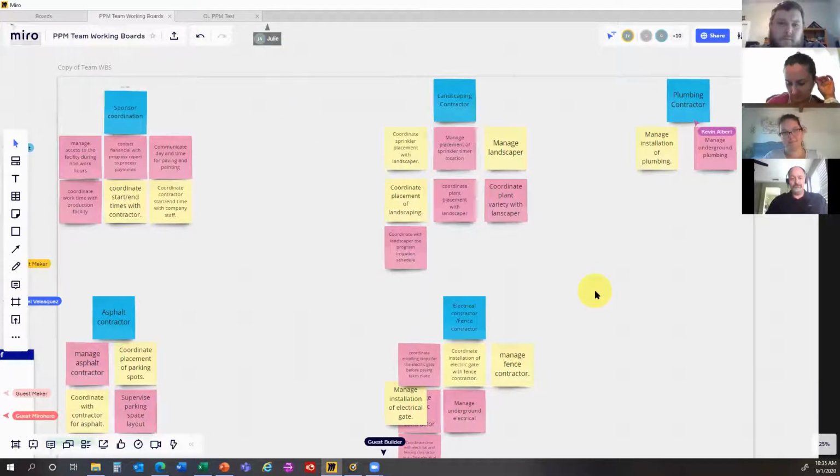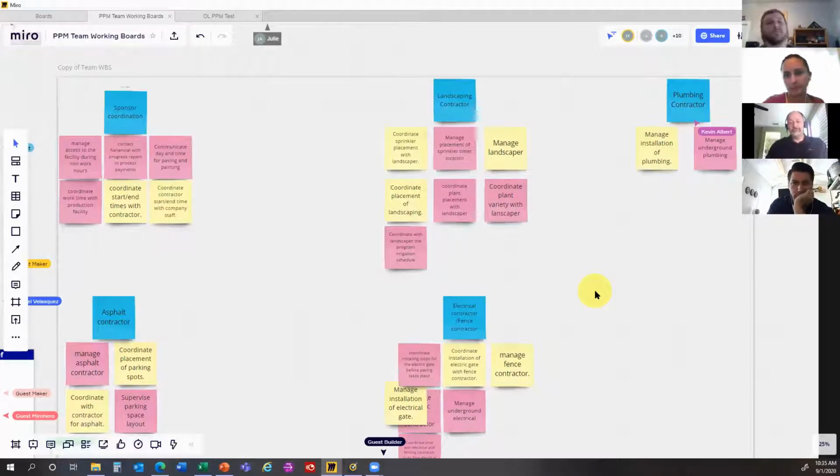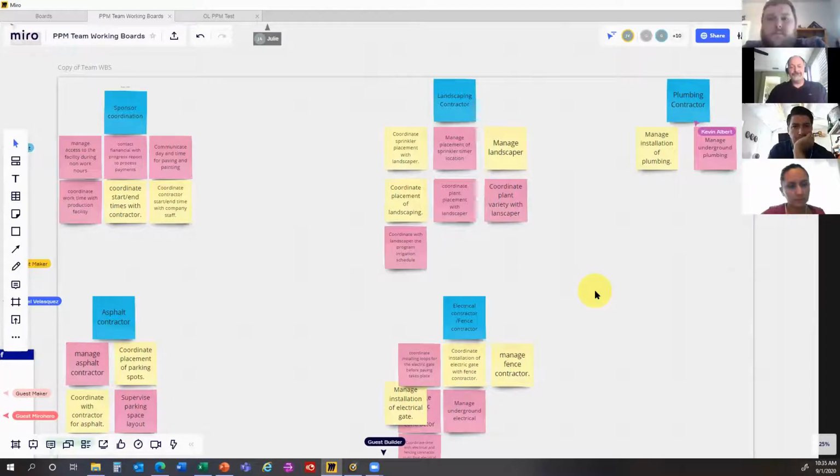And that's good, because in real projects, there's always that 1 or 2 little things that nobody thought about, or nobody thought, oh, we actually need to have a vendor do that, or oh, that's got to be done in-house because it's so small. We're finishing up a project right now, and we had a single air actuated gate. And we put in the system that we would have air, but nobody put in there who was going to install the solenoid that controlled the air. And so the electrician was ready to wire the solenoid, and the contractor that built the equipment was like, well, we made accommodations for an air cylinder, but nobody was going to make it talk or work together. So we ended up having to come up with something at the last minute and do it. So yeah, that was my thoughts.